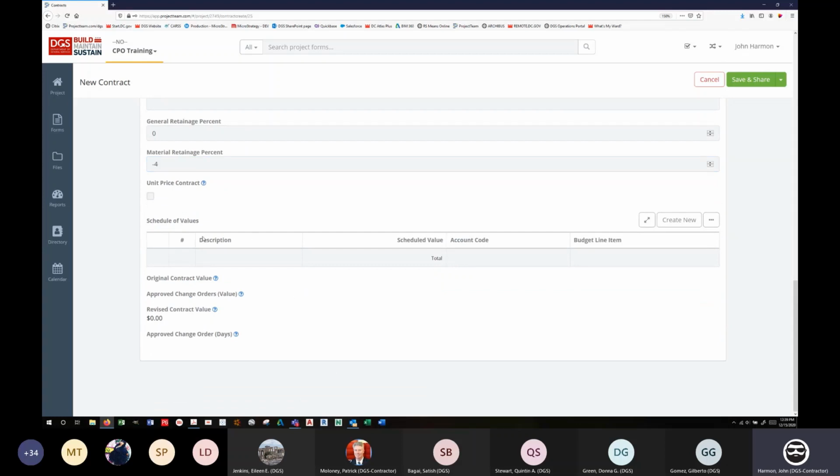All right. The next one is the schedule of values. So this is important for you to also pay attention to how your contract is structured. The general basic rule for everything is match the purchase order. If the purchase order has 3 lines, your schedule of values in here should have the same 3 lines. Okay. Some nuances to that you need to be aware of is sometimes you have a contract where there are reimbursables. You may have 1 line on your purchase order and that has a 5 or a 10% retainage on it, but you also have reimbursables that do not have retainage.